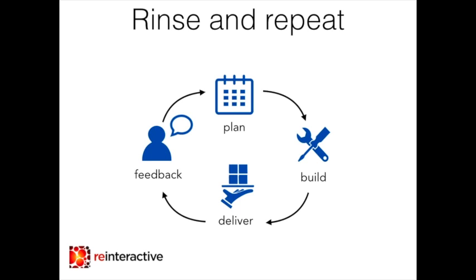A client who could cause the project to go a bit longer there might want all of that sign-up stuff to happen on the front page in one window and look really snazzy. Now that's fine, and there's no problem with developing that. However, it's better to do those sorts of progressive enhancements, or enhancements to the basic working functionality of the system, towards the end of the project, when you've got the key portion of the project done.